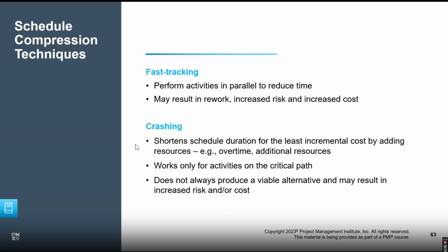Is a change request needed before completing? No, it's not. A change request is not needed for this one because it's still within the project manager's domain. You have certain authority to work with this, and yes, it depends on what allowance is given by the management. A change request will be required when your baseline gets impacted, and that's what we want to avoid. We want to avoid the baseline getting impacted.